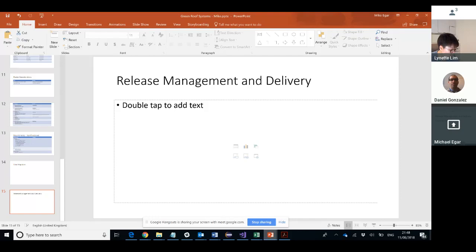There'll be, I guess this is a project risk, essentially 10 user groups with potentially very different views of that data. So getting them to test and validate the migration will be difficult. The mapping docs from their systems to Salesforce, the extraction criteria, and any data cleansing rules will have to be communicated very clearly to those users to get them through the testing, i.e. the data migration UAT.